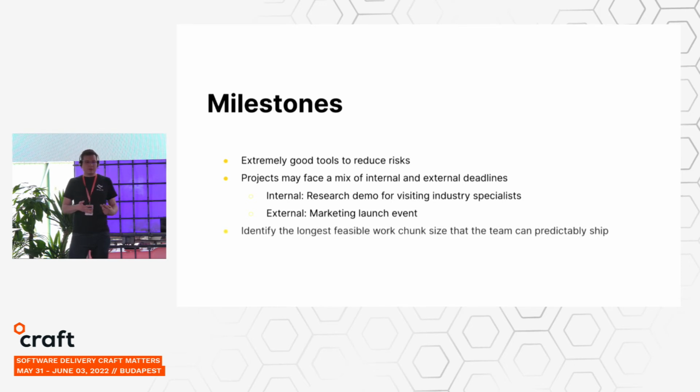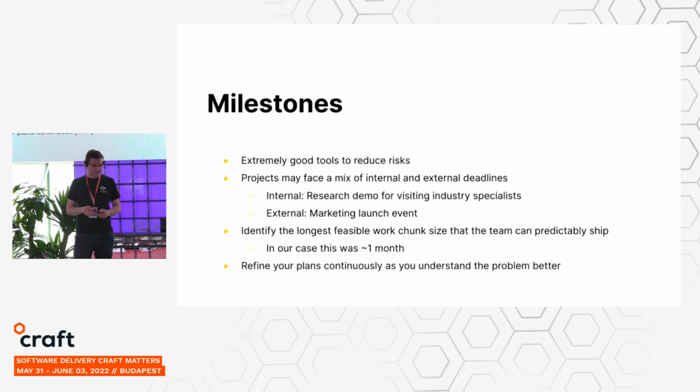So we had to be really mindful of how we were breaking down the work, and we did this by identifying the longest feasible work chunk that our team was able to handle with a predictable ship cadence. In our case, this was roughly 1 month, but this might be very different for your team. So just take a look at your team and understand what the right chunk of work is that they can handle.